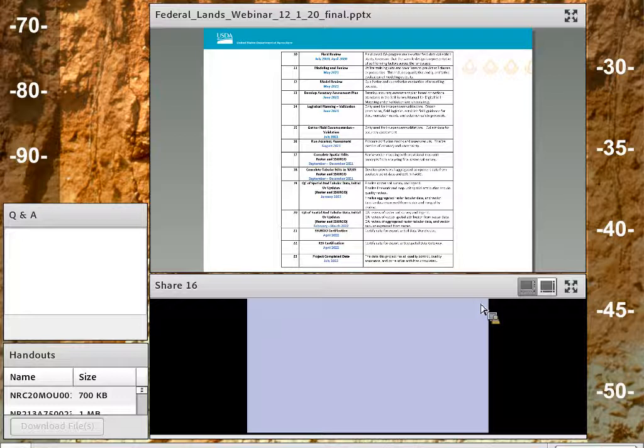So these milestones look a little bit different than what would actually be in our national database, because what we've done is taken these milestones and lumped them together so that we're only indicating which ones are important to our cooperators, and because some of those are internal to just NRCS, this just allows us to let them know when we're doing the different necessary steps that they may be interested in or may be significant to them.